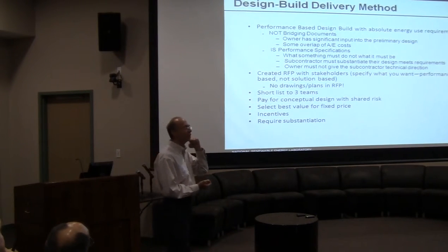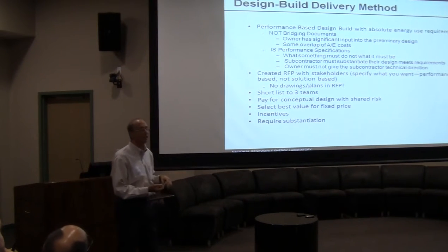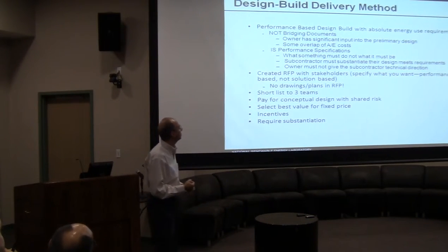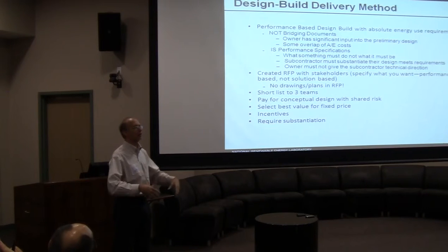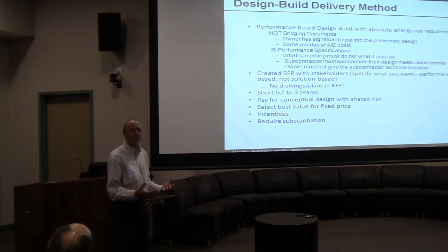We sent out an RFQ nationally, request for qualifications, looking for people that had an interest and had the bonding capability to do this kind of project, and had some interest in doing low energy buildings with very little specifics. We used their standard corporate profiles that they send in, if you're familiar with that, with doing procurement. We evaluated those teams based on those.